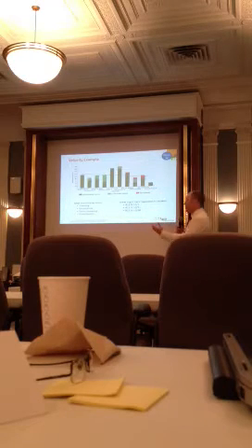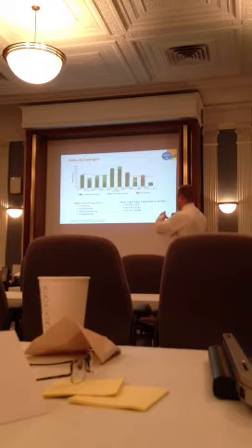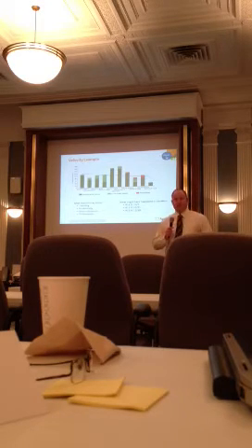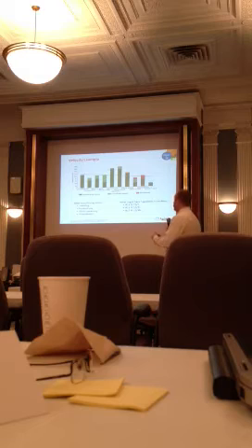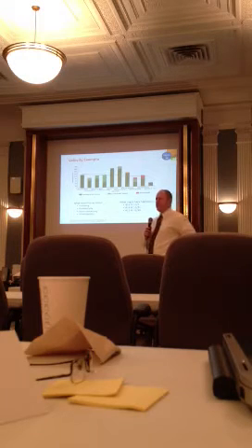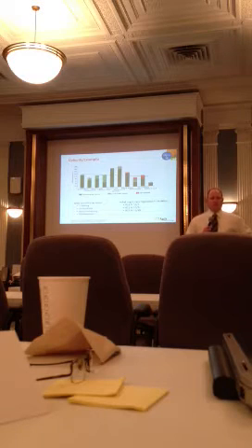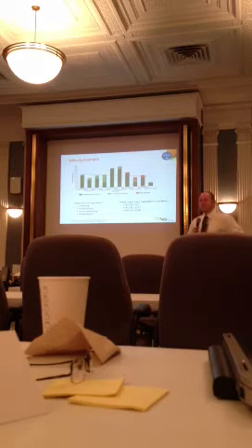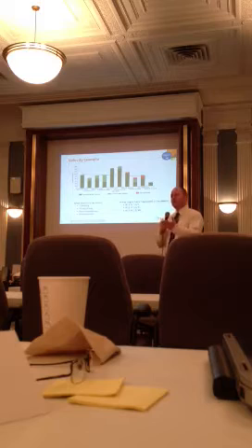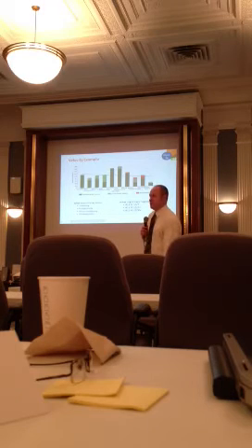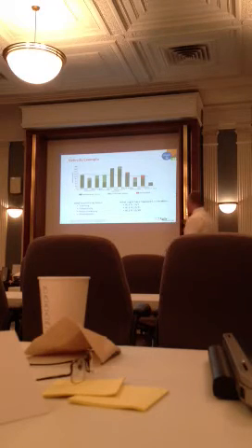We essentially fit 3 iterations into 2 of work, because now we're delivering 150, 160 story points instead of 105. So now the next iteration comes, and I go, you know what? My team's been doing a pretty good job over these last couple of iterations. It seems as though they're a lot more effective. So even though those 2 people rolled off from the Skill Factory Scrum team, I let my team commit to almost 120 story points.